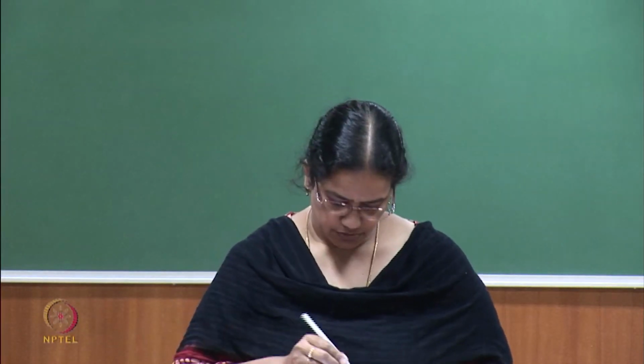So, for the complete stretch you may have an activity called excavation, but the entire subunit may not be the same. I may have a different type of soil, I may also land upon rock excavation. So, the equipment may differ, the number of sub activities in order to do the excavation may differ. I may not have the same activity as such throughout my subunits, throughout my repetition stretch. Okay. So, they are all called non-unit based repetitive projects.